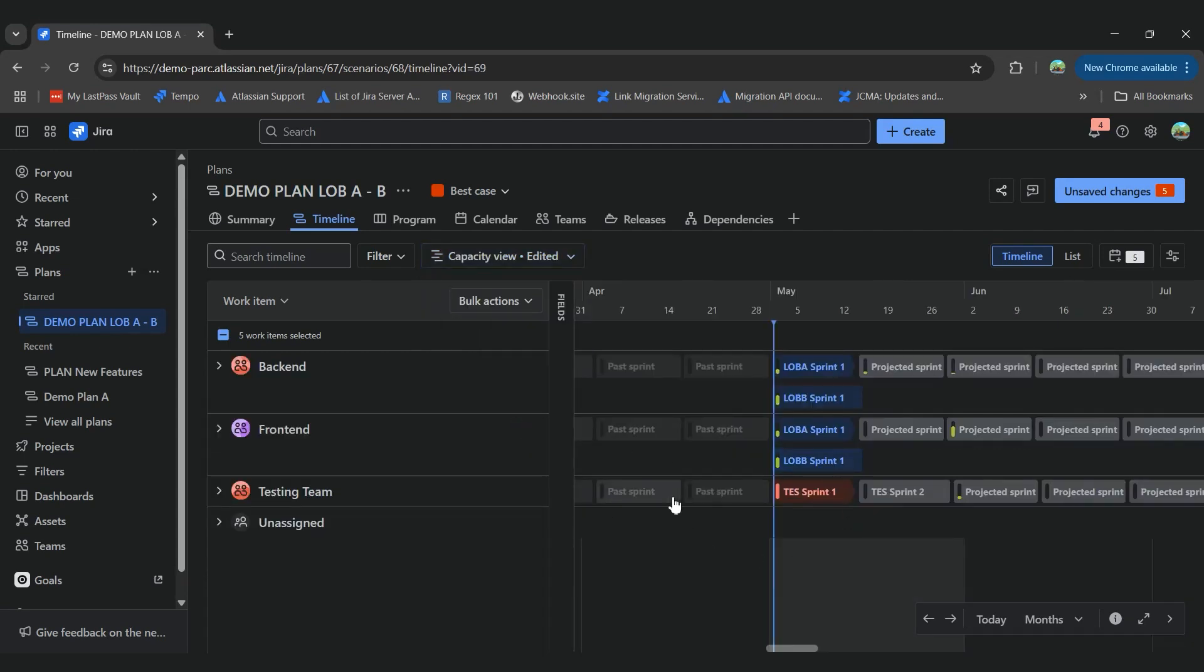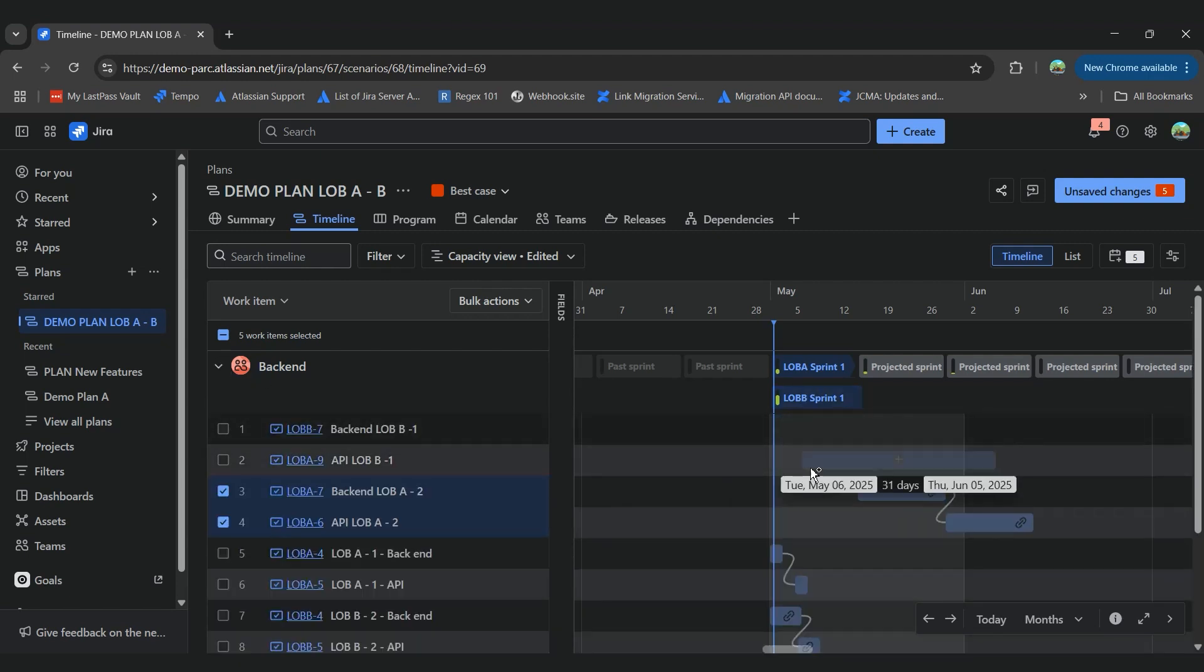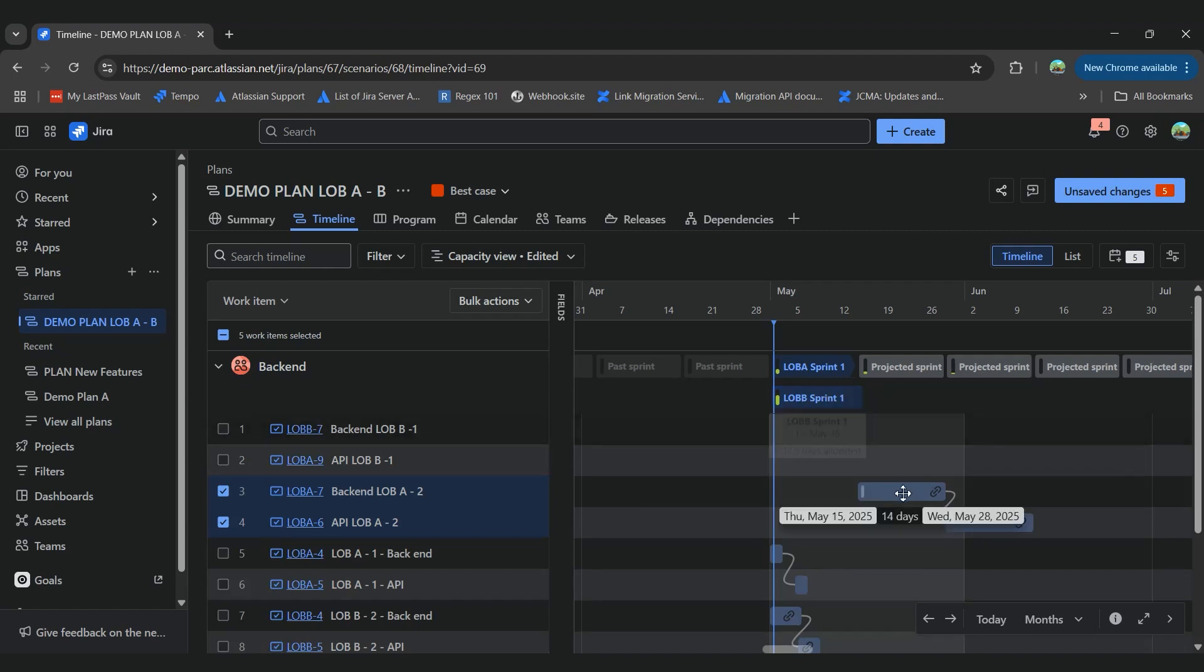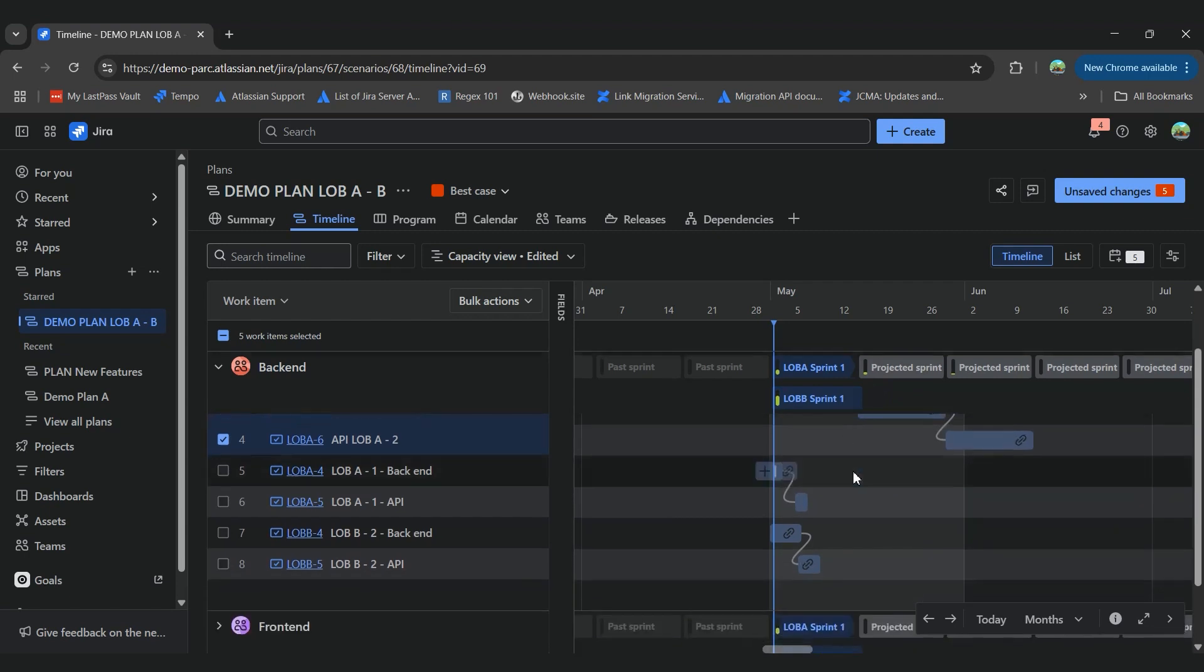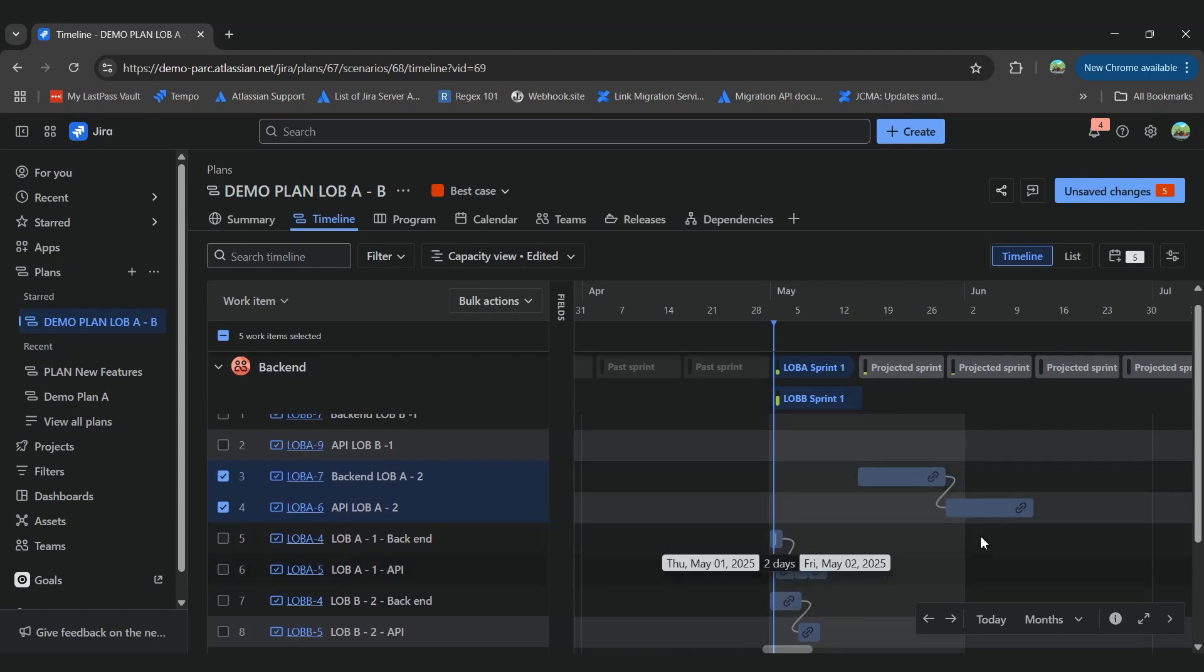So let's go to our capacity view. And here we can see our information. So let's check the backend. And here on our first sprint, we have 8 out of 12 and a half days allocated. And that's why our tasks that will take more than 3 or 4 days won't be able to fit on the first sprint. That's why they move it to the next one.